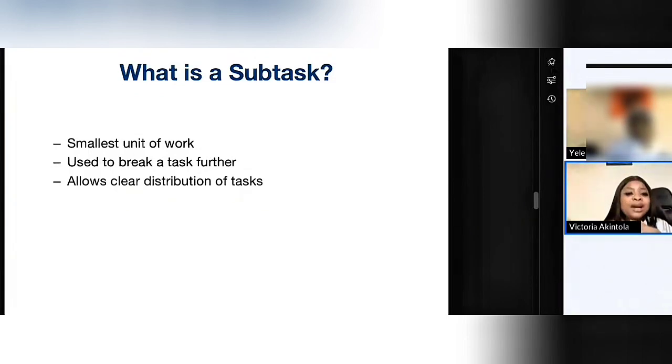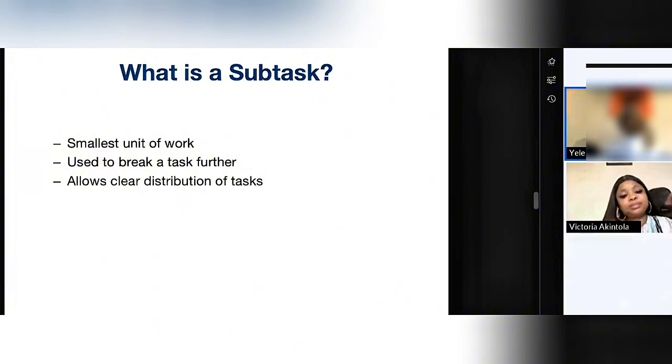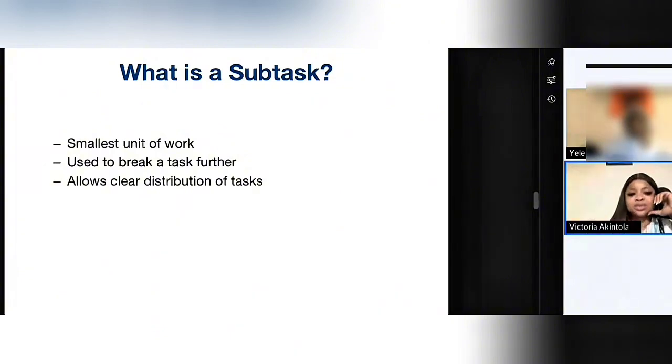So it's just to simplify that work in a way that is not overwhelming. It's just to make sure that the user story is independent, is negotiable, is something that can be estimated. Does that make sense? We can estimate the time that it will take to get the work done. It's a small thing. It's not something too big. So you see that we're breaking it down small. It's specific. It's not something very big that is not understandable. It's not something that we cannot complete. And it's something that we can test as well.